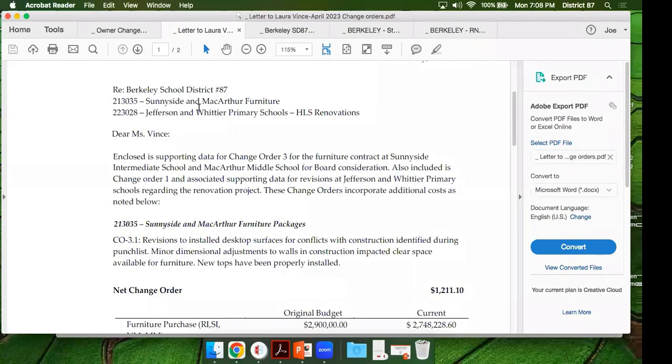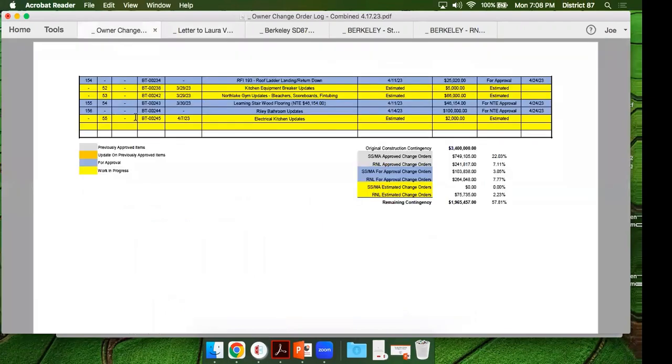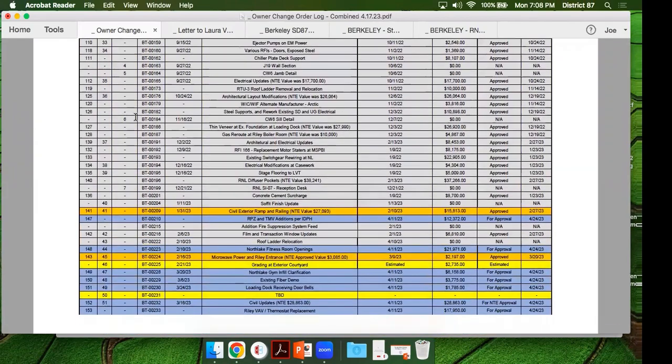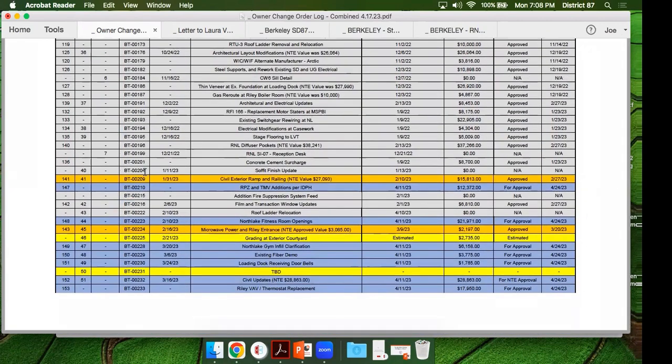And the last one is change order 146, which is for the replacement of 3 bathroom lock sets, for which the lock sets were tampered with. Parts were removed from those doors and have not been found. So we're proposing to replace those lock sets. The remaining parts and pieces will be turned over to the maintenance staff so that they have those to use if they should be needed in the future. So the replacement of those lock sets, the cost is $3,992.